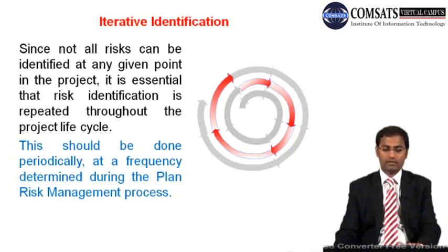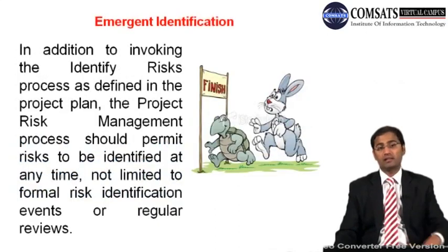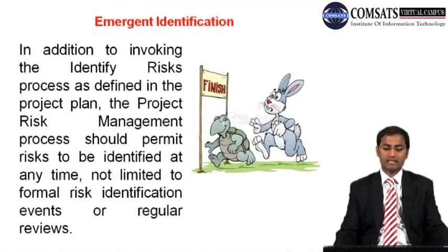So there is another definition, and that is emergent identification. In addition to invoking the identify risks process as defined in the project plan, the project risk management plan process should permit risks to be identified at any time, not limited to formal risk identification events or regular reviews. So the project team members should be, again, frequency, method, and all the stuff we have discussed earlier is coming into play in these slides as well.